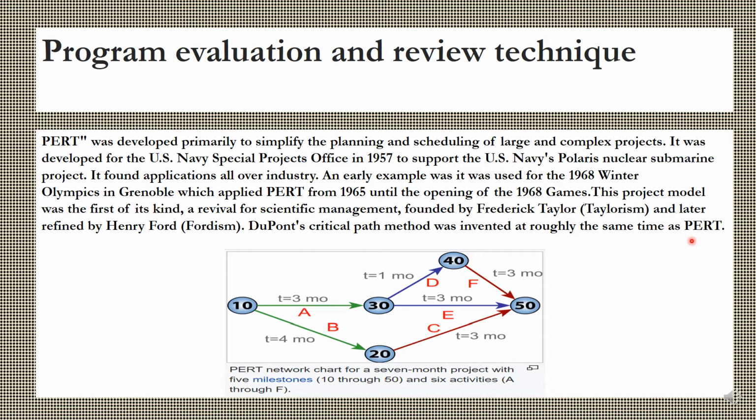Now, if you see the process of PERT or CPM, the activities and events that should be performed to complete a program are clearly identified. Activities are represented by arrows, events are represented by circles or nodes. An event is the actual performance of a task at a given point of time, while an activity represents time and resources for progressing from one event to the other. Events provide a basis for measuring the program.